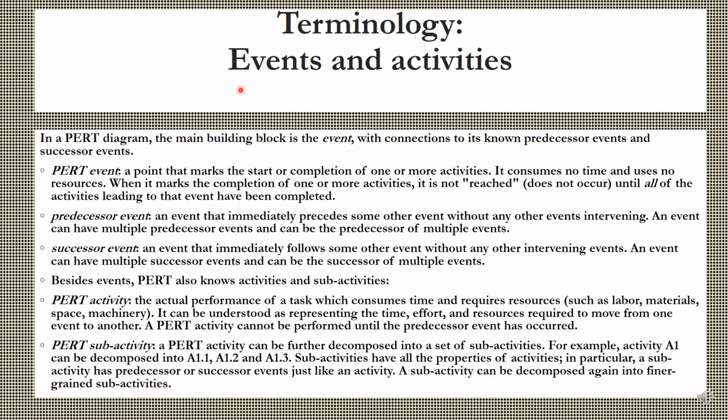Now, like I told you, events and activities. What is a PERT event? A point that marks the start or completion of one or more activities. It consumes no time and uses no resources. When it marks the completion of one or more activities, it is not reached until all the activities leading to that event have been completed.